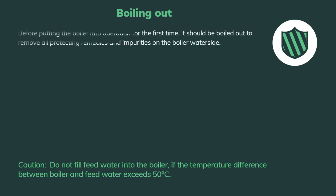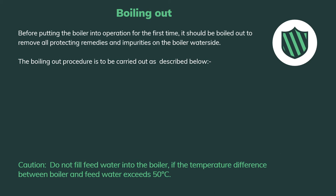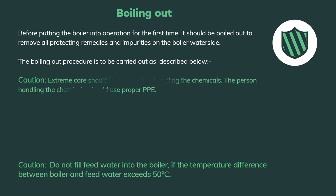Boiling out — before putting the boiler into operation for the first time, it should be boiled out to remove all protecting compounds and impurities on the boiler water side. This is done during commissioning of the boiler. Extreme care should be taken while handling the chemicals — the person handling them should use proper PPE.